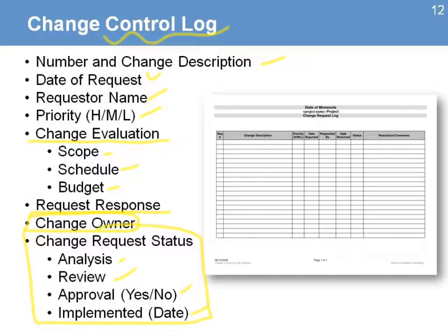Depending on the conditions that we have in the project, we can make those changes in a way that helps us have a good analysis, have the time to make the decisions, and have a group of people who can then make the decision. Depending on the type of change, again, you can have different levels. Small, quick changes that are not going to have a major impact on the schedule or on the budget can be done by the project manager without much analysis. Other changes that will have a larger impact may include more analysis, more time, even for the decision and approval, and even the approval of additional funds that are needed in order to implement that change.